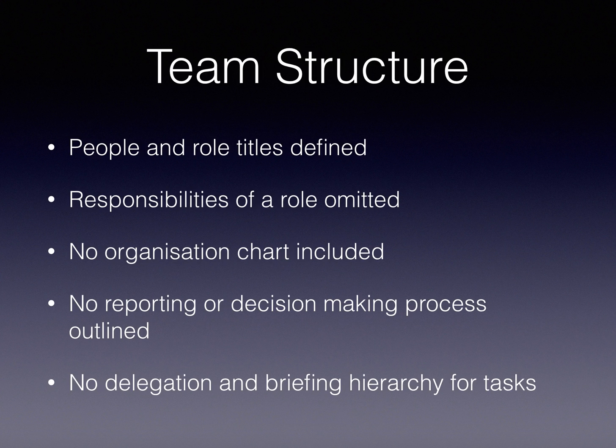The team structure gave people role titles, but the responsibilities of those roles were omitted and never really elucidated in any detail. There was no organisation chart, and there was no clear hierarchy about the reporting or decision-making process within the team structure, whereby team members should report to the project manager about whether they're having difficulties with a project or whether they've got enough clarity of a brief.